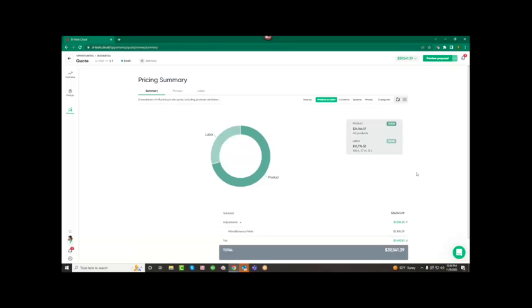Yeah, thanks, Chanel. So this is really where the rubber meets the road for everybody here who joined the meeting to learn about how to make more gross margin, and this is really where it happens. So what Chanel is showing us is that our mix on this job is 70% product, which that's bundling equipment and parts together, right? So that's where that 70% comes in. That's everything that's not labor. And then of course labor is about 29%.